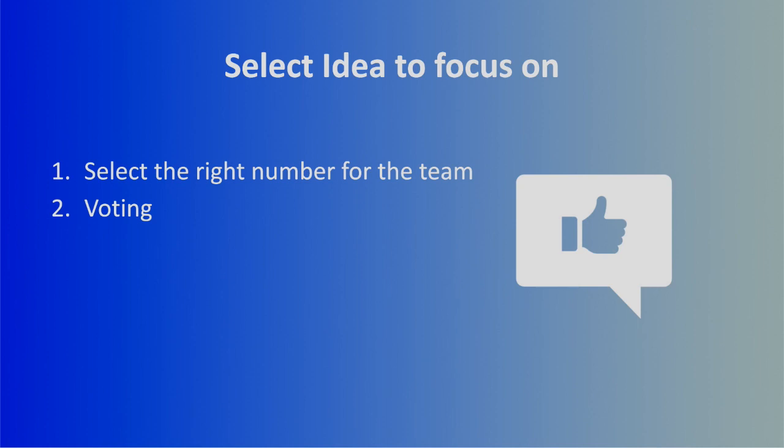So you take all of those ideas that you just generated, and the best way to do this is just voting. If you're using a lot of the agile software management tools, you'll find they have built-in stuff for retrospectives or voting. If not, you can just use chat programs and enter votes or say the votes. Voting, it's pretty simple. You can come up with a lot of different ways to vote. But the idea is you want to vote and select the 3 highest things that are most important for the team, right? And this is a team decision, right? It's not any one individual. We want to select what the team thinks is going to have the most impact on our next sprint.